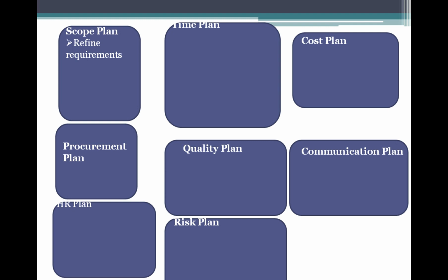He creates the requirements traceability matrix, and assigns an ID to each requirement, who is responsible, which stakeholder has high influence, what the deliverables are, who the resource assigned to these requirements is, and the acceptance criteria. All this is documented in the requirements traceability matrix.